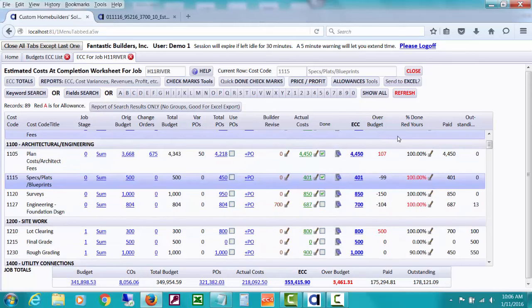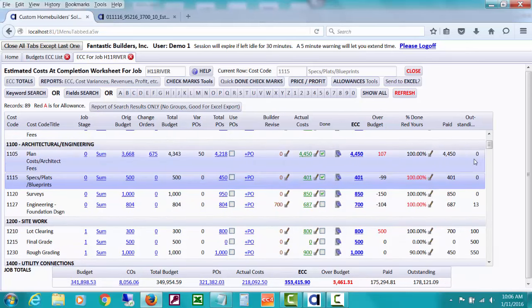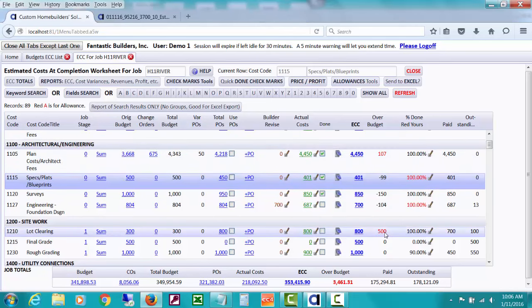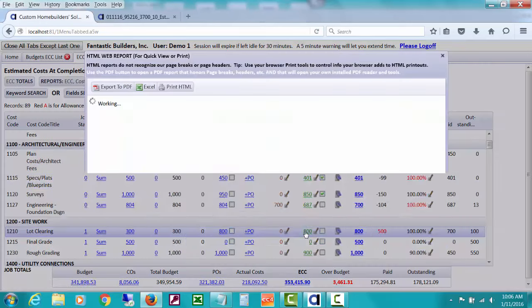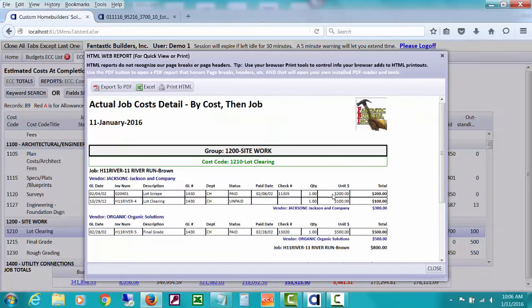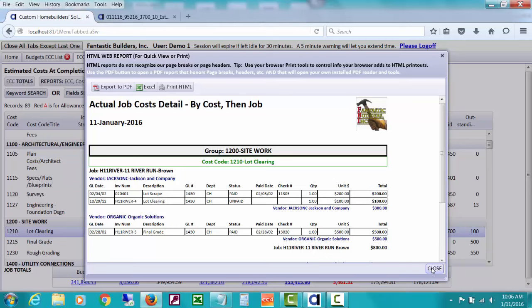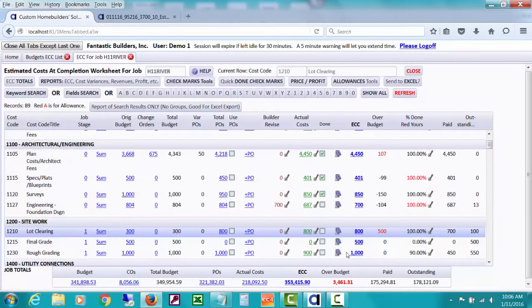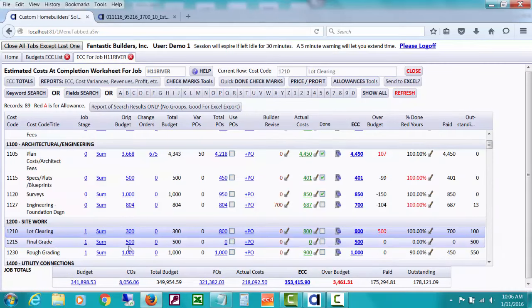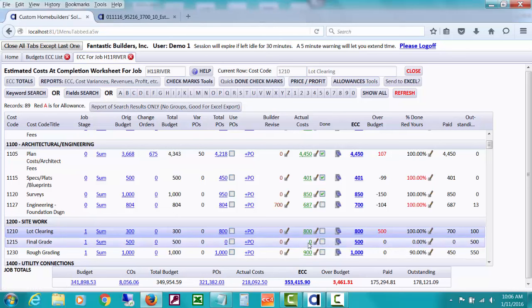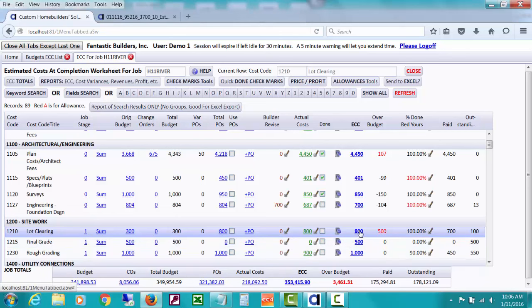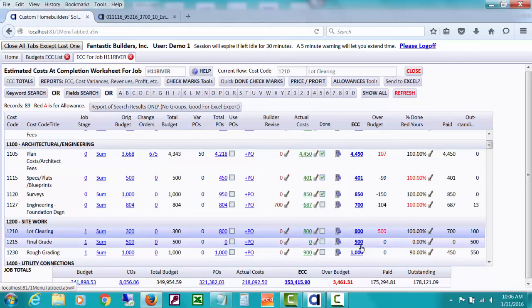This total over budget amount is a total of this entire column. It's easy to spot things that are over budget and start studying on why that might be. I'm going to do a detailed video about how this is allowing you to spot that probably somebody posted, if you drill down on the actual costs, posted this $500, and it even says final grade here. They posted it to site work instead of to final grade, and I'm going to show some videos about how from this window you can drill down and correct both the PO and the actual costs so that they get on the correct line so that this won't be showing over budget, and these two will be showing right on target.